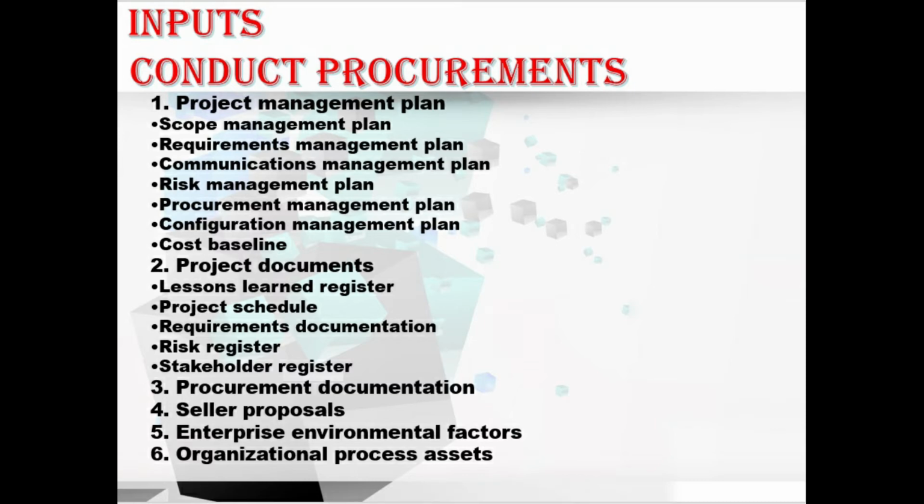Moving to the risk register. Each approved seller comes with its own unique set of risks depending on the seller organization, the duration of the contract, the external environment, the project delivery method, the type of contracting vehicle chosen, and also the final agreed upon price. All this information is stored in this risk register.